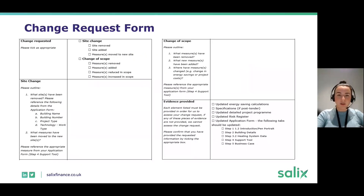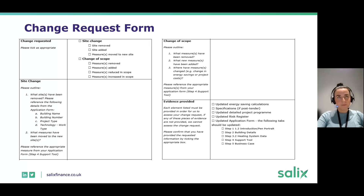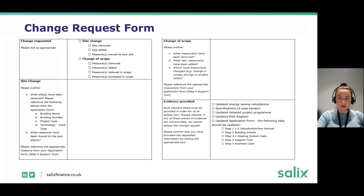The change request form should be shared with you by your relationship manager and is also available on the Phase 3A section of our website. The form asks you to lay out why the change is necessary, what the change is, and what supporting documents you've provided. It's really important to tick the boxes indicating what sort of scope change it is and what measures have been moved or removed, so the technical team can easily understand what's going on.